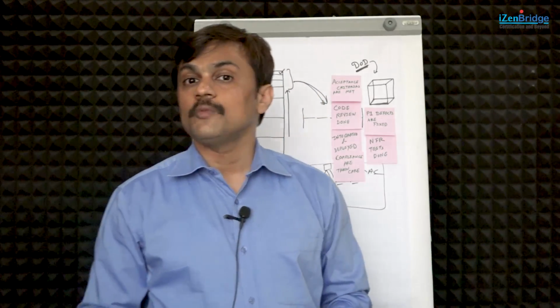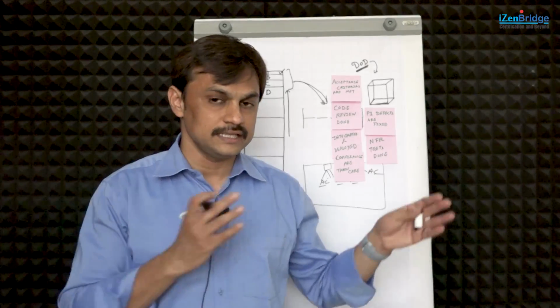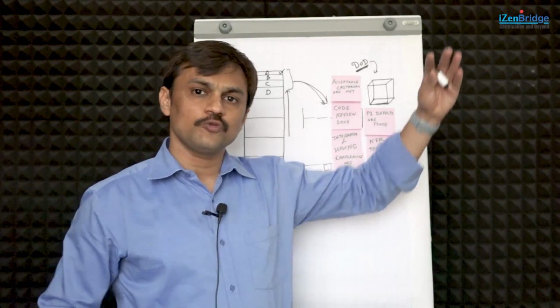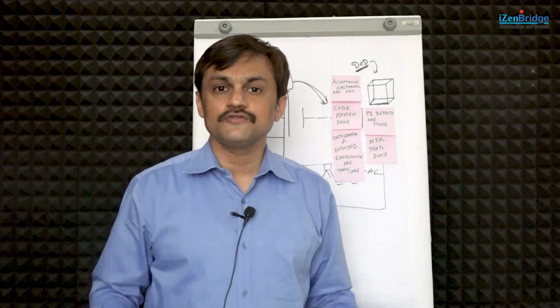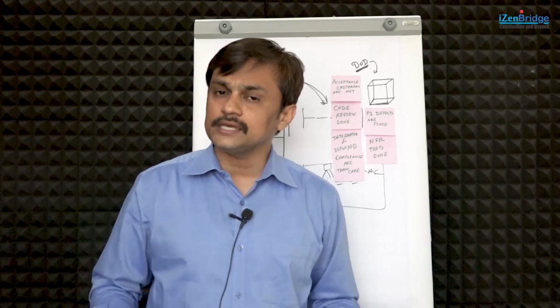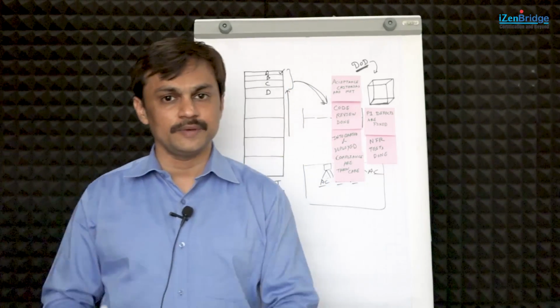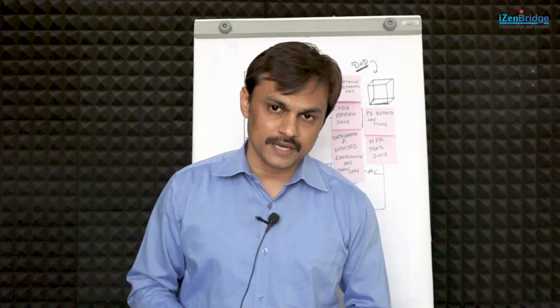Say right now you might be only fixing P1 defects and you realize just fixing P1 defects is leading us to a good accumulation of P2 and P3 defects. Now, going forward we want to say we must fix P2 also, we must fix P3 also, something like that. What is happening here? You are changing your definition of done, which will be applicable from this point onwards. So, that is done in the retrospective meeting.